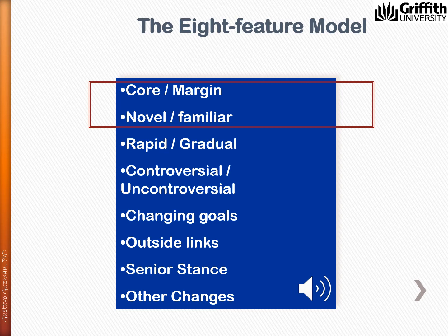It is very well known. Now, at the other extreme, we have novel projects that use methods, technologies, and solutions that have never been tried before in the organization. Because the context and the features of the project are uncertain, solutions are usually developed during the development of the project. In this case, there is a high degree of uncertainty about the final result of the project.